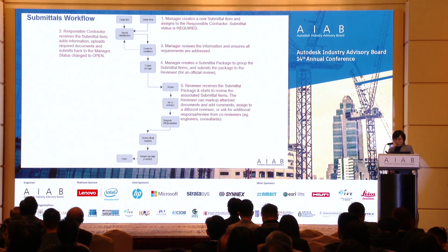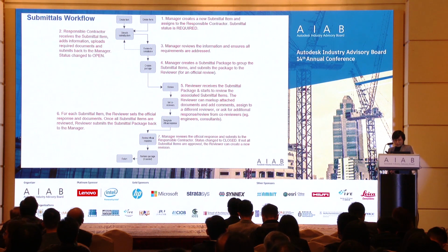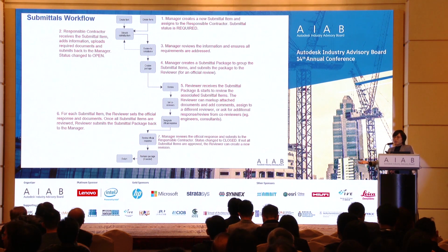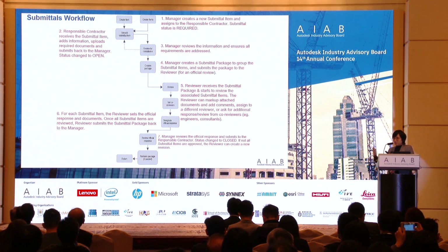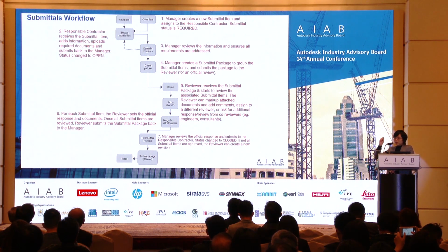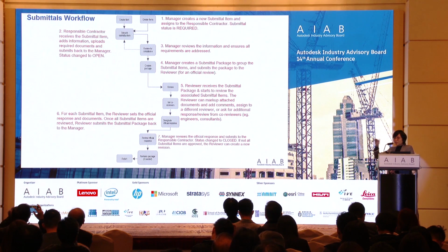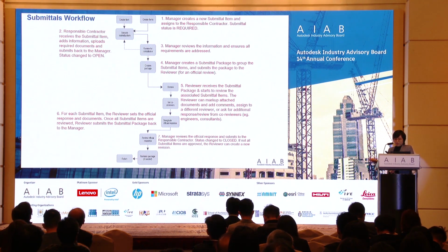And the submittal, which is quite complicated, I will just quickly give a brief. Maybe you have some subcontractors who have to submit documents to you. BIM 360 Build offers a platform for the subcontractor to submit all the folders inside BIM 360, and the contractor or the general manager can receive that information in one single platform. Then they can go through this process to reject or accept the submission.